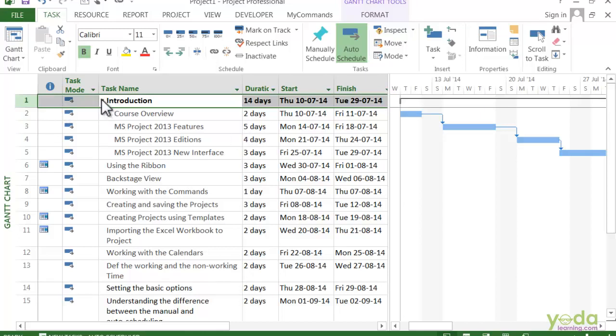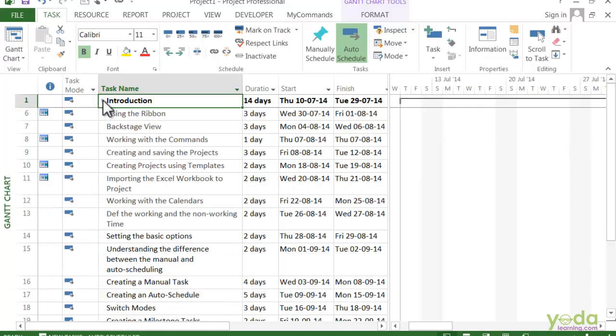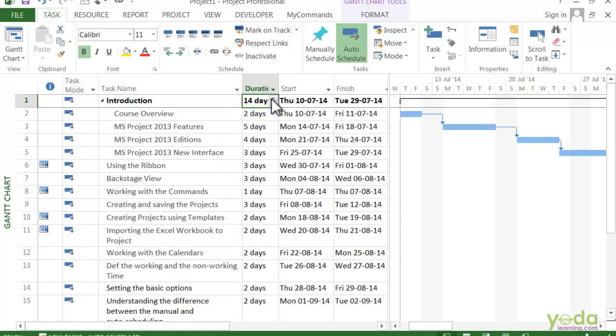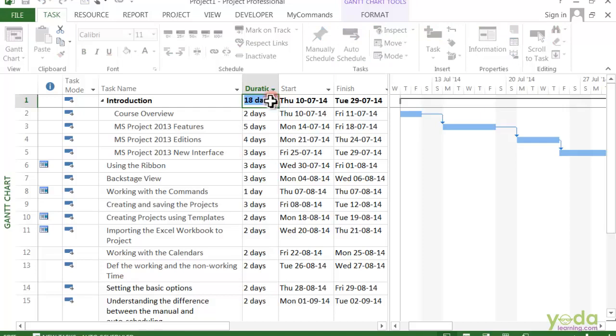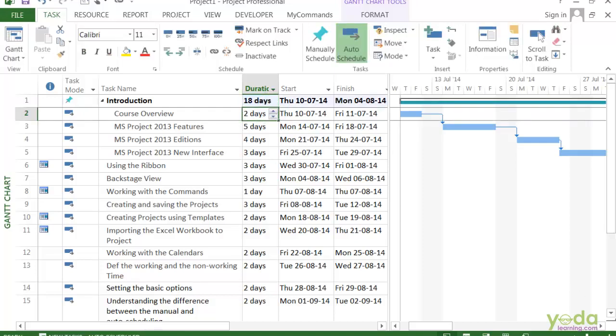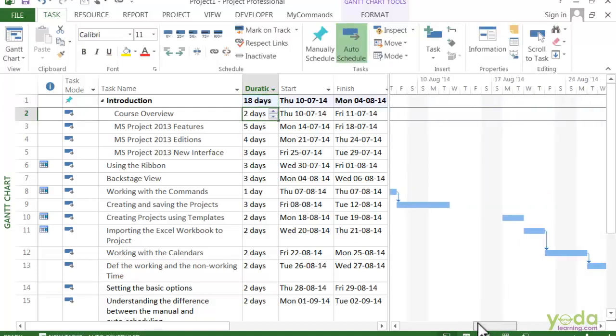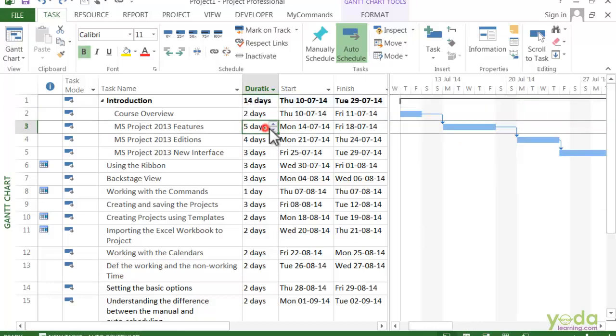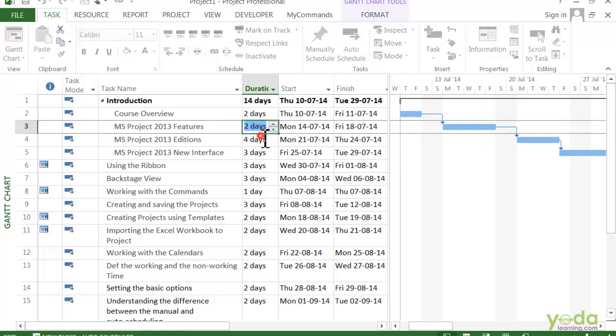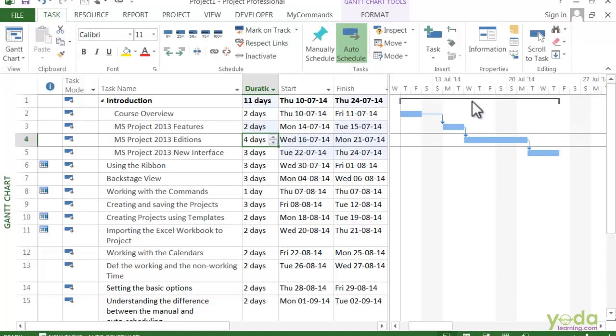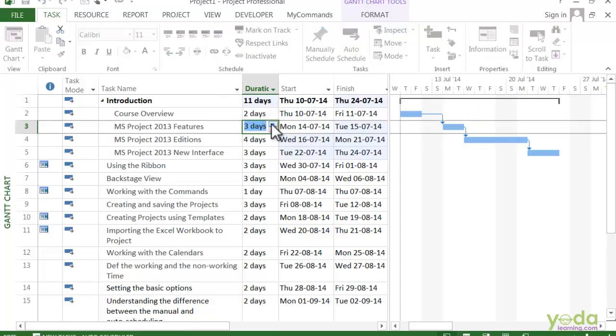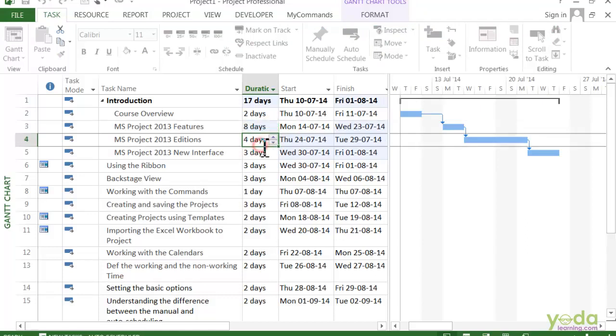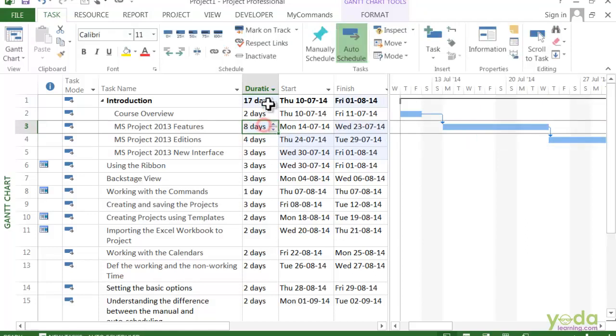Now, if I change the days for Introduction to say 18 days, you can see here that the duration of the summary task is 18 days. Now if I reduce these five days to say two days, introduction reduces to 11 days. And if I make this eight working days, it will go to 17 days.